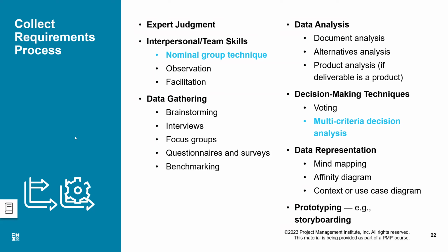But naturally, if your organization is spread out in many cities, many areas, dispersed globally, it won't be possible to have a single workshop. So when your audience is spread out in a very dispersed way, we resort to another mechanism which is called questionnaires and surveys.